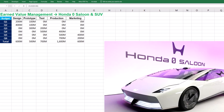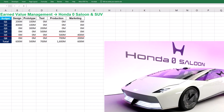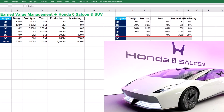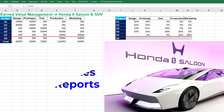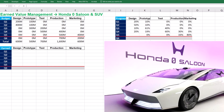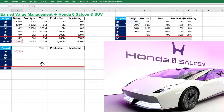We are asked to audit the project progress at the end of the fifth quarter or Q5. This review date is also called the status date or data date. Here we need to find the value of completed work by finding the progress achieved. We can find activity progress percentages by the end of Q5 by obtaining status updates and progress reports from engineering, production, and other departments. Activity earned values for each quarter are calculated by multiplying the percentage progress and total activity budget. For example, the earned value of design in quarter one is $120 million.